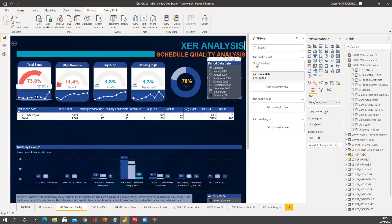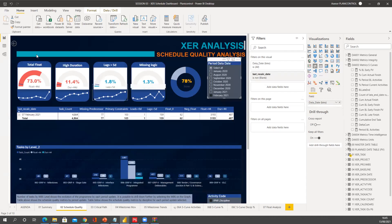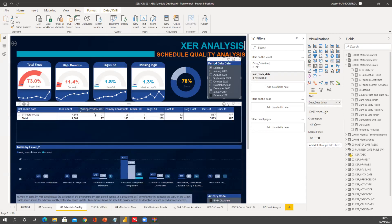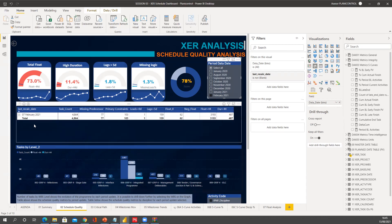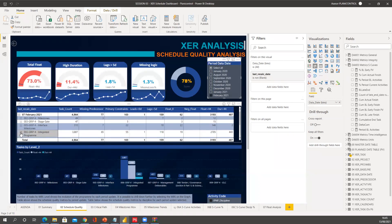But these two I'm worried about, and then I can check where I need to find them. So if I go here, float over 44 days, there are 3,000 activities. That was really horrible. So I can drill down here and I keep looking at that WBS levels. I see 2,000 here. I keep looking there until I'm fully content with where I need to address those issues.